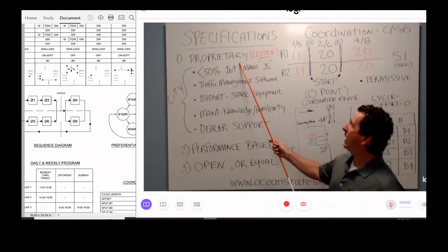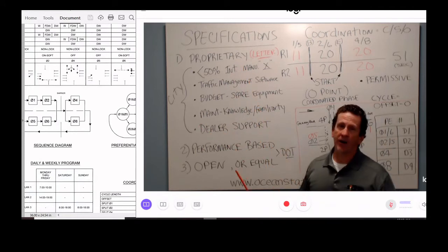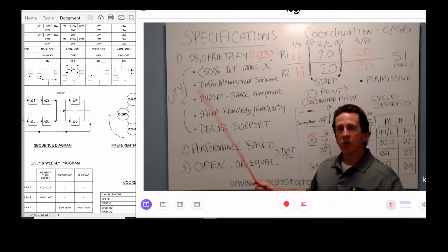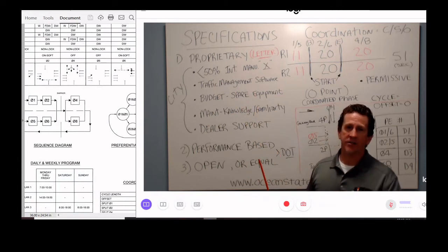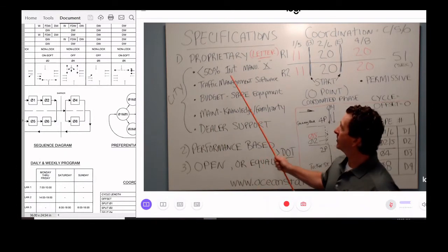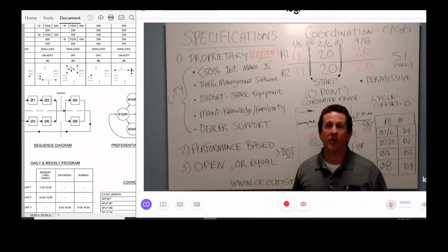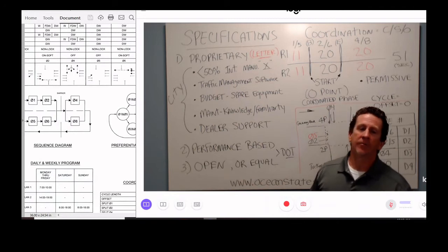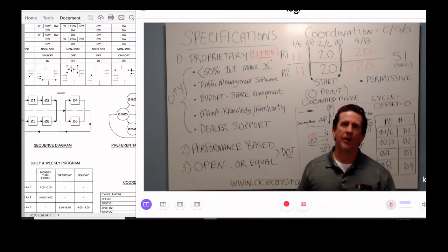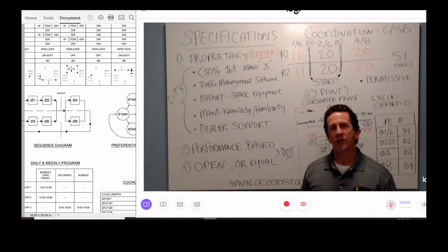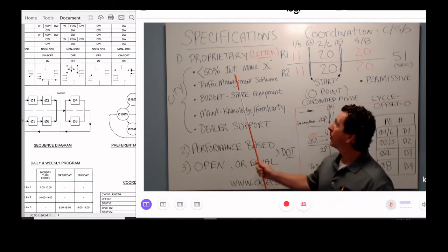we would say you may have to provide a proprietary letter. You would get a letter together on your agency letterhead and point out all these facts. You can cite projects that you've recently done, and financial investments the city's been making over the past couple of years, going in this direction. Because proprietary specs are allowed.